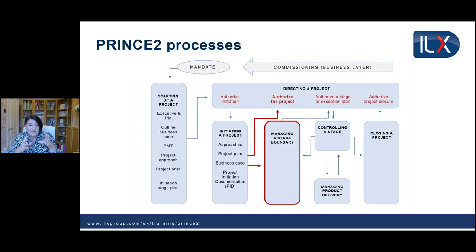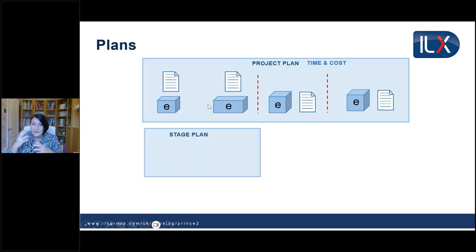So from initiating a project, that project plan and the business case is going to go inside the PID along with all the approaches, up to the project board in directing a project, asking them to authorize the project. But before we go to the project board with the PID, first of all, we would nip across into managing a stage boundary. And in managing a stage boundary, we're then going to create the stage plan, the next stage